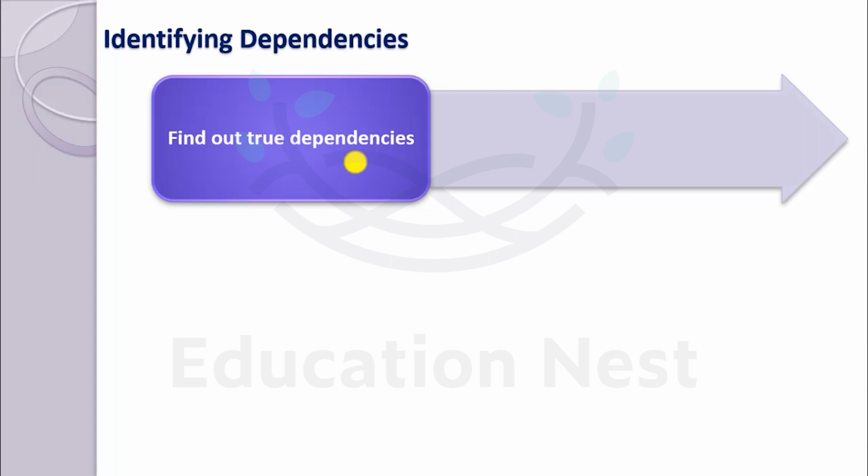It could be which deliverables depend on others, and also in a project, identifying dependency includes external dependencies, like for example the other vendor or the third party you are dependent on. In some cases, the project organization depends on matrix kind of systems. For example, I was handling an insurance IT project, and it was a huge project consisting of 50 to 100 members. But the main part of the project, the core team, actually it was an insurance product, being built by some other team sitting in some other geographical location.